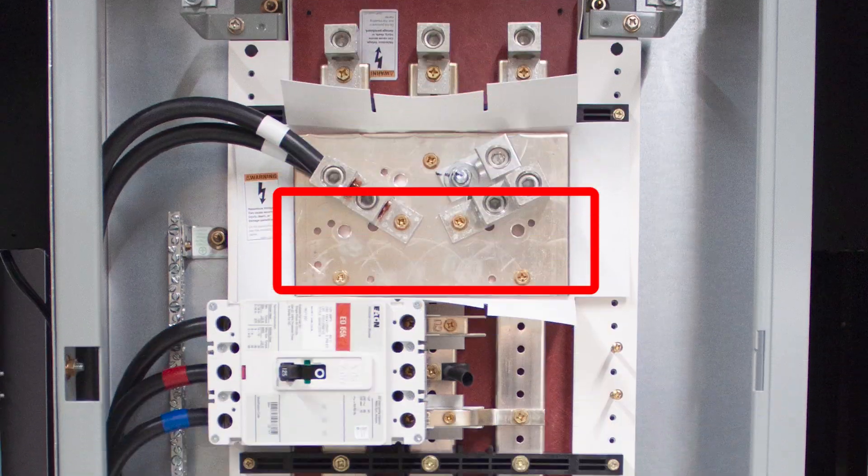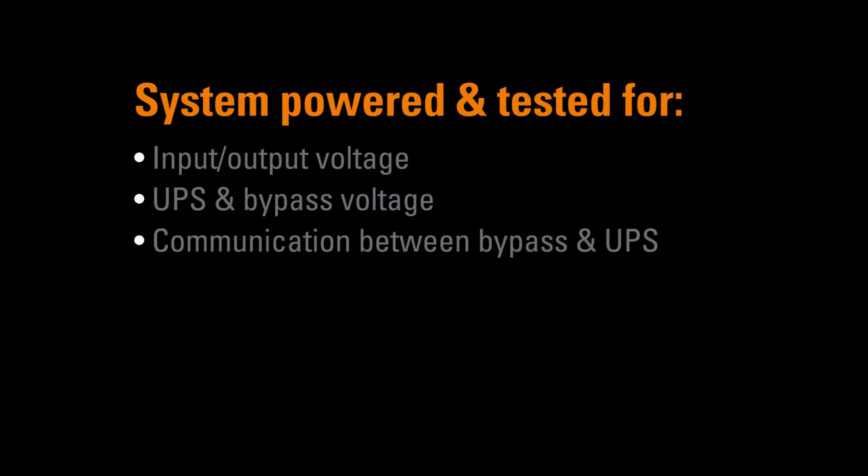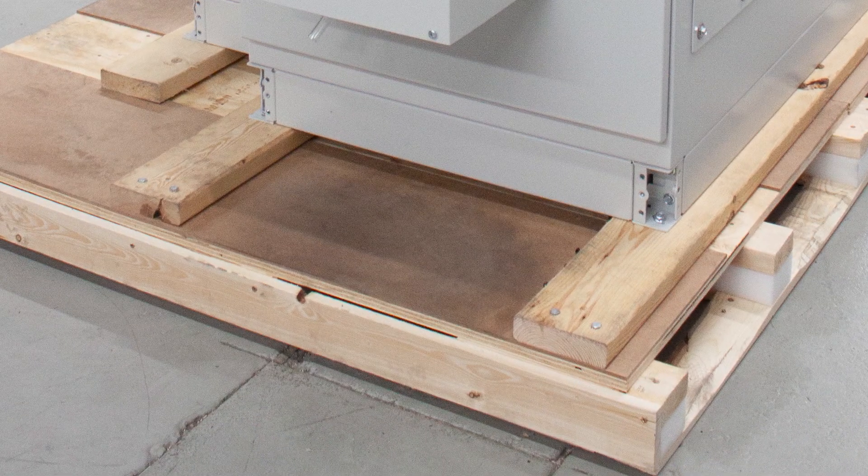Only a single input and output connection is required at installation site. The system was temporarily powered, started up using the manufacturer's recommended procedure, and functional testing was completed, covering input and output voltage, UPS and bypass voltage, and current readings taken at the output, communications and correct operation between maintenance bypass and UPS, HVAC system, emergency systems including hydrogen over-limit and ambient over-temperature, and full system load test. The system was then secured to a custom shock pallet and prepared for shipping.